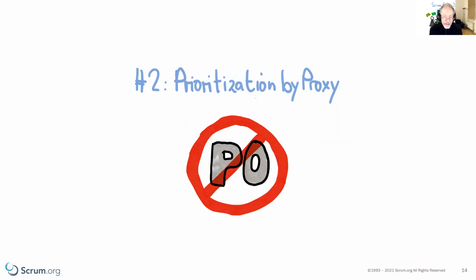So that is really critical. How can you spot those? Again, I go through items in the product backlog, and I try to understand items that have a prolonged refinement period. I like to look for items where there's a reference to external input needed or external approval needed.